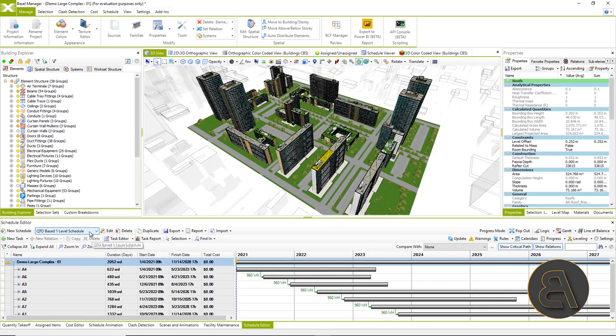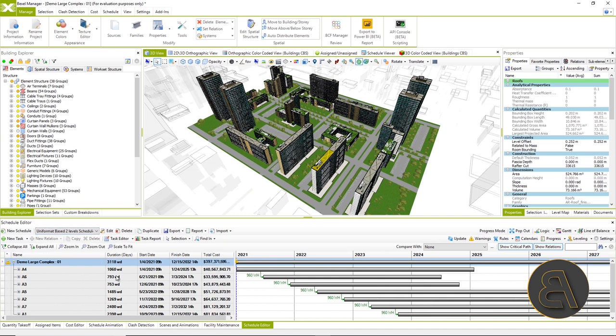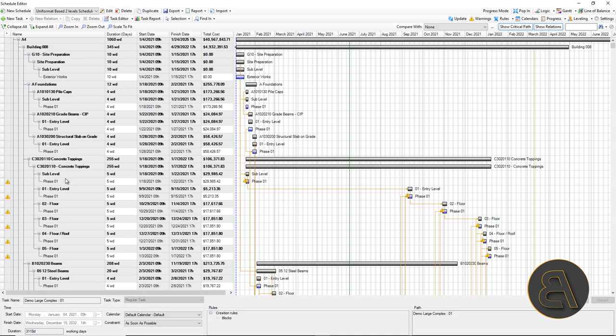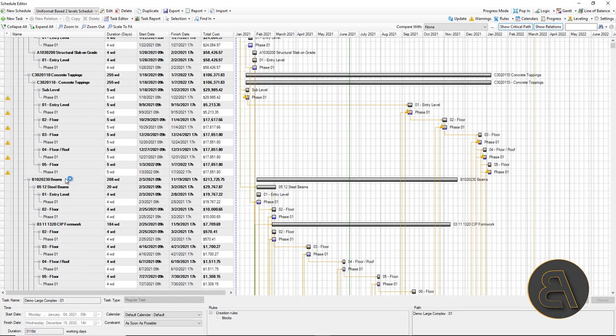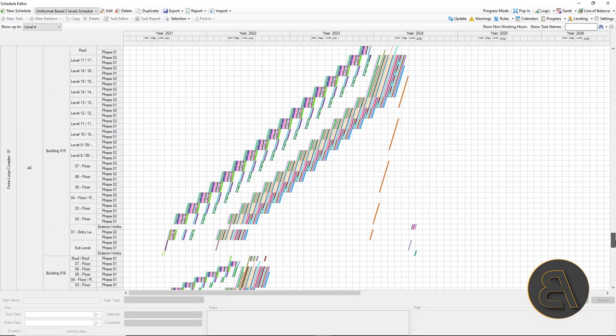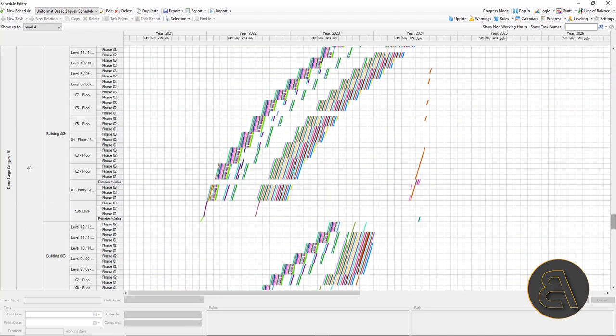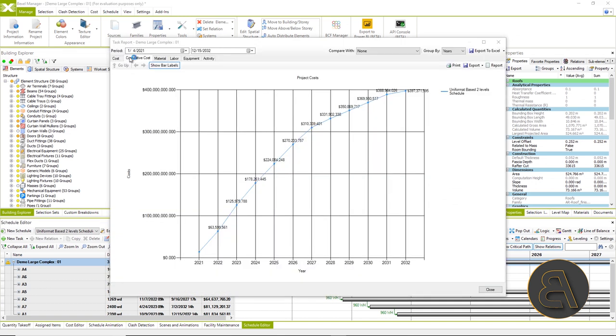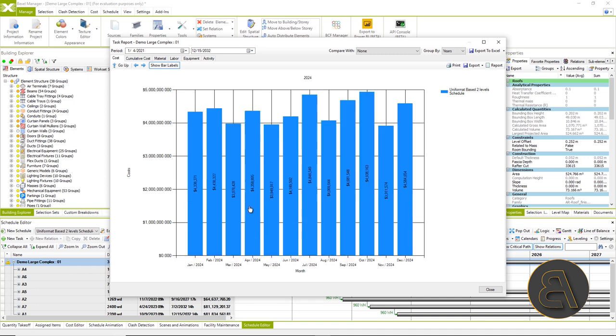If we choose a dynamic plan from the sample model that is created using the uniform cost database and methodology, in addition to 5D simulation, we will get a very detailed cash flow analysis on annual, monthly, and daily levels, as well as resource analysis for a complete project or selected group of activities.